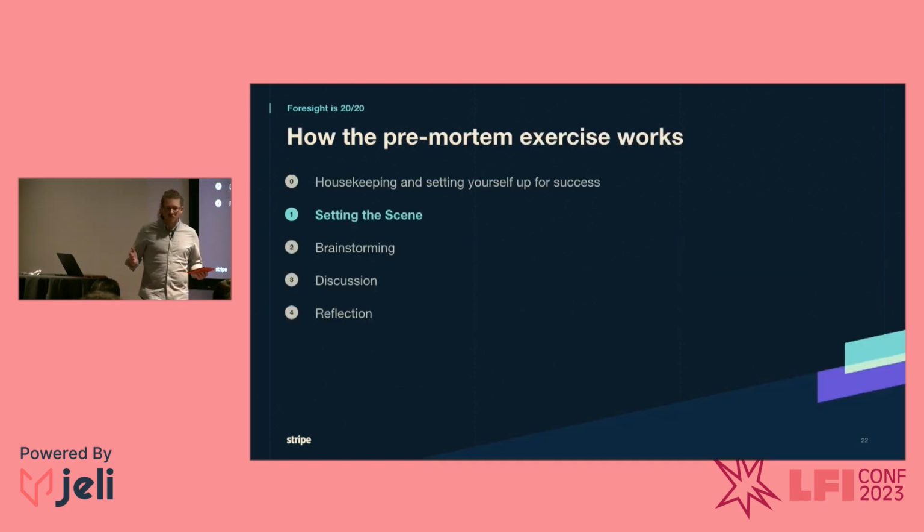Great, so now we're set up for success. Let's actually step through what a pre-mortem exercise can look like. So at Stripe, we break this down into 4 parts. Step 1 is setting the scene. Step 2 is brainstorming. Step 3 is discussion. And step 4 is reflection.